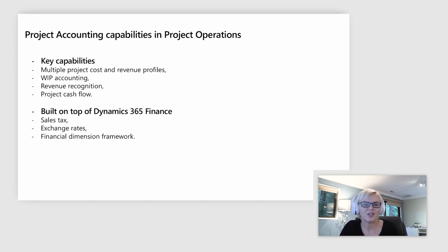We support percentage completion, completed contract, straight line, and work in progress revenue recognition calculation methods. The system can calculate revenue estimates automatically on a periodic basis based on project forecast and actual transactions that project team members are entering over the period. Or an accountant can review those calculation results, adjust if needed, and confirm recording to the general ledger. I have a demo ready for you in just a minute, so we will look at a quick example soon.